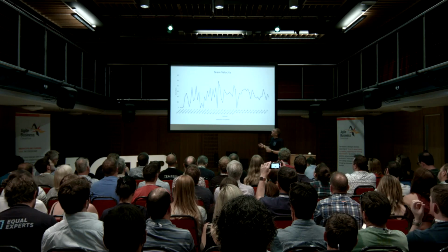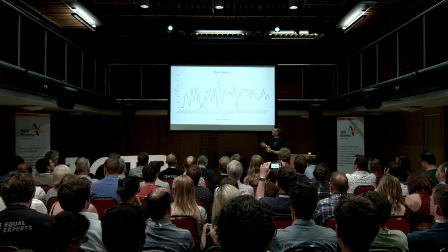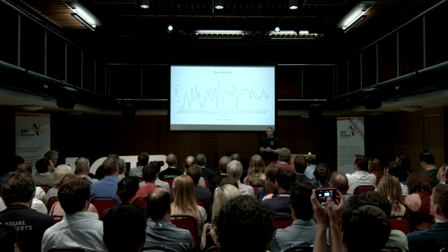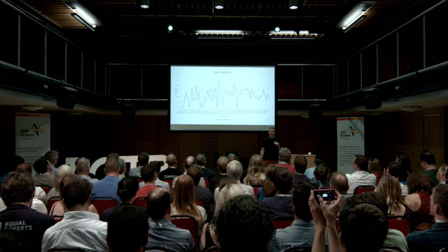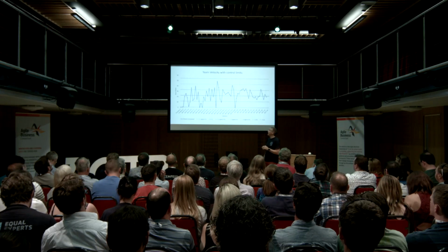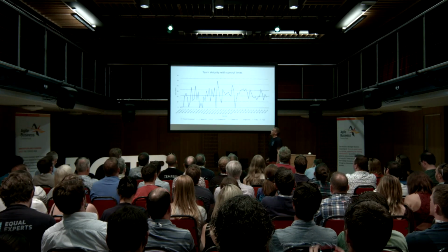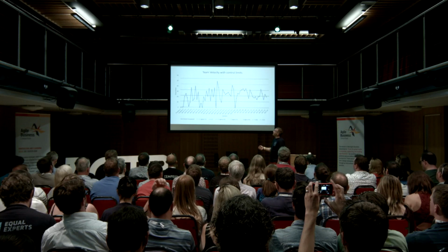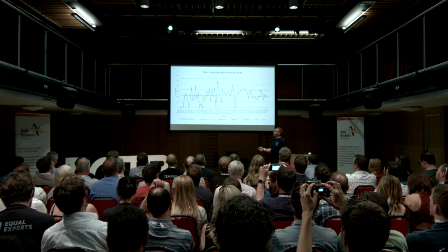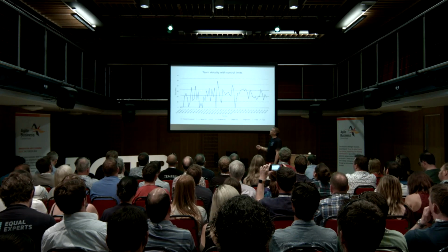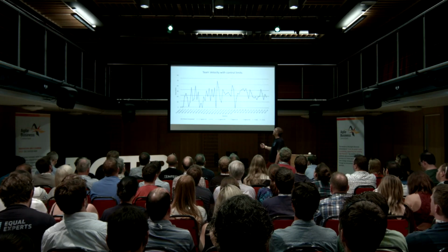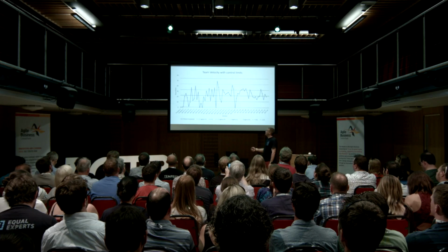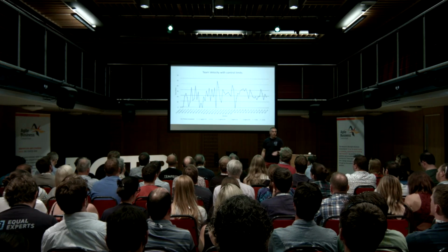But what I'm interested in looking at is, I can see it's going up and down, but is this something that we should be concerned about or not? So we can make this look a bit easier to read by adding on some control limits. The solid green line is the average, and then we've got a 1 sigma confidence limit, 2 sigma confidence limit, and an upper confidence limit. And then coming down 1, 2, and then the lower confidence limit is on 0.